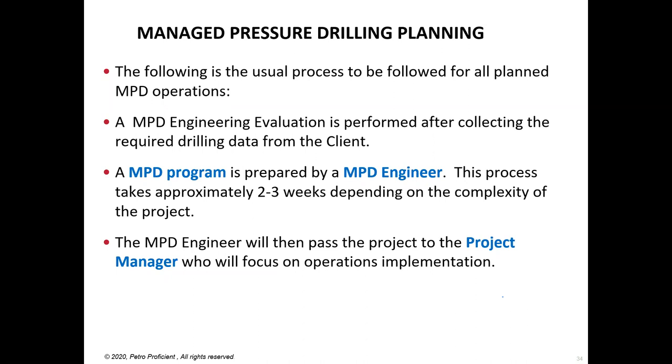You collect the required data from the client. If you are a client, then you need to give out this data to your MPD provider. But if you are an MPD engineer, then you collect this data. I'll show you the list of data in the next slide. And then an MPD program is prepared by an MPD engineer. This process takes approximately 2 to 3 weeks, depending on the complexity of the project.